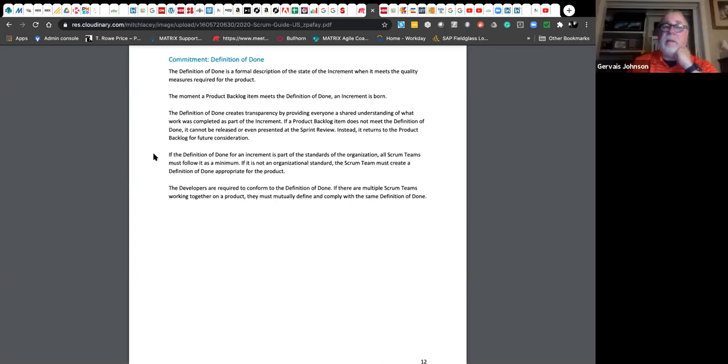It could be. I mean, they leave it open. I think they're just making a statement here that if you have teams of teams or some kind of organizational level where that group of people came up with a standard definition of done they would like everyone to follow, then you can do that. And that's pretty common in frameworks like LeSS, where we have multiple teams using one product backlog, right? So you'd want to have a collective definition of done for those teams, because we're all releasing into the same code base and releasing into production, right?